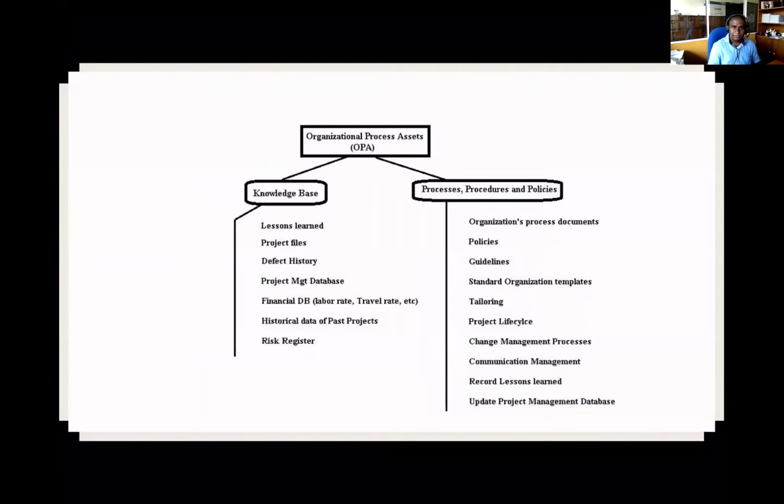Organizational processes are the company's experience. The company that you have has experiences, the lessons learned, the templates. And that's why I said I don't mind you taking an existing project where you have the BOQ, where you have the contract, everything. Because it's okay. Only thing is you should be able to adapt it to a context given. Lessons learned, the project files, the templates, the existing BOQs, the databases, the number of people that you have, the project life cycle. Those are organizational process assets. Those are data, those are inputs that you need to find out in preparing the project charter.